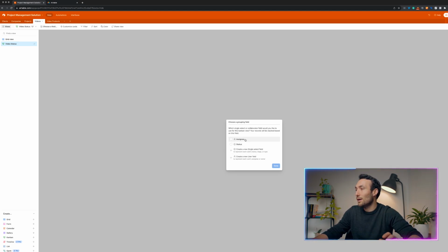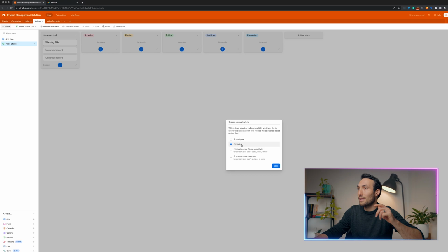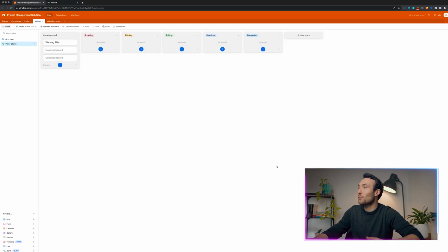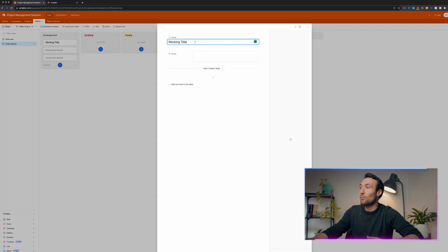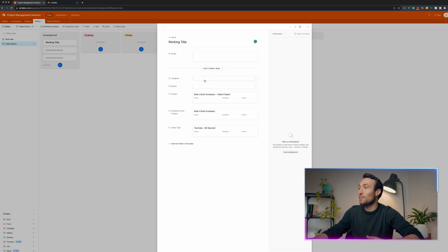Now it's asking us here, how would we like to group our videos? And we want to group them by status. So let's click status, and very quickly you can see that it's just pre-populated a beautiful Kanban board with our scripting, our filming, editing, revisions, and completed. And this working title project that we had here, when I click on it, we can see the project it's under, see the client, we can see the type of video that it is. We could assign it to a specific team member if we wanted to.